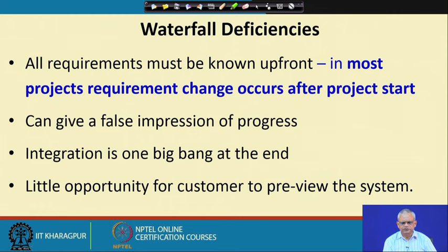Possibly the most problematic deficiency is that the requirements must be known upfront. The customer has to give all the requirements before the project starts, and that is usually not feasible, because the software is not there yet and the client has to imagine what is required. It is very easy to miss requirements, give ambiguous requirements, or wrong requirements. Normally, only when the user sees the software do they say that this is not what they wanted.